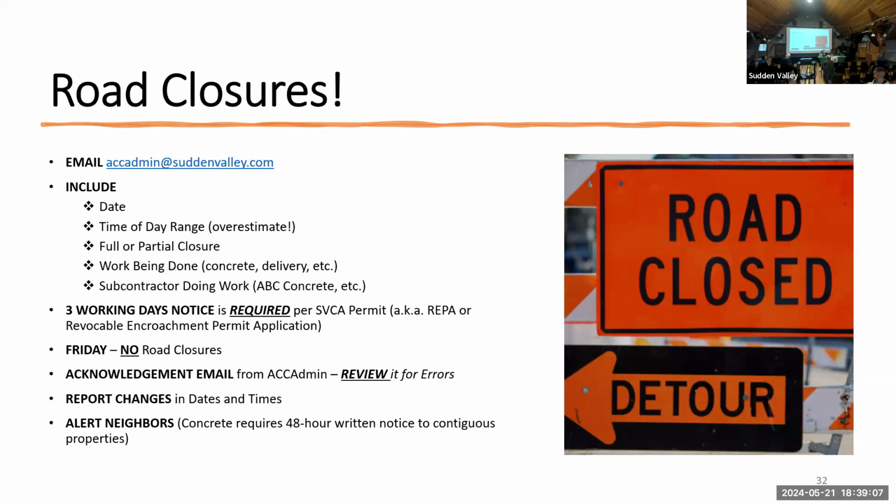So if I get a call from somebody, they're doing something down here, they got the road closed and I don't know what they're doing because you didn't tell anybody, at least then we can say, don't worry about it, it's just them delivering trusses. It's fine. So the REPA says that you have to give us 3 working days notice. It's required by the permit from Sudden Valley. Fridays are a big no for a road closure.